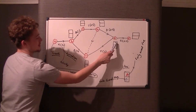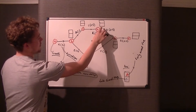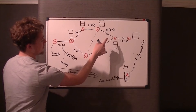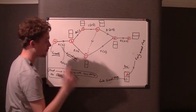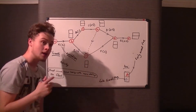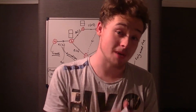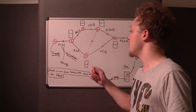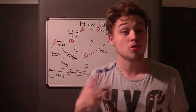I'm not saying the number at node four will be the same as at node five, but what I'm saying is: the Early and Late Event Times within node four are the same, and the Early and Late Event Times within node five are also the same. That's a critical event — and the critical path is made up of critical activities.